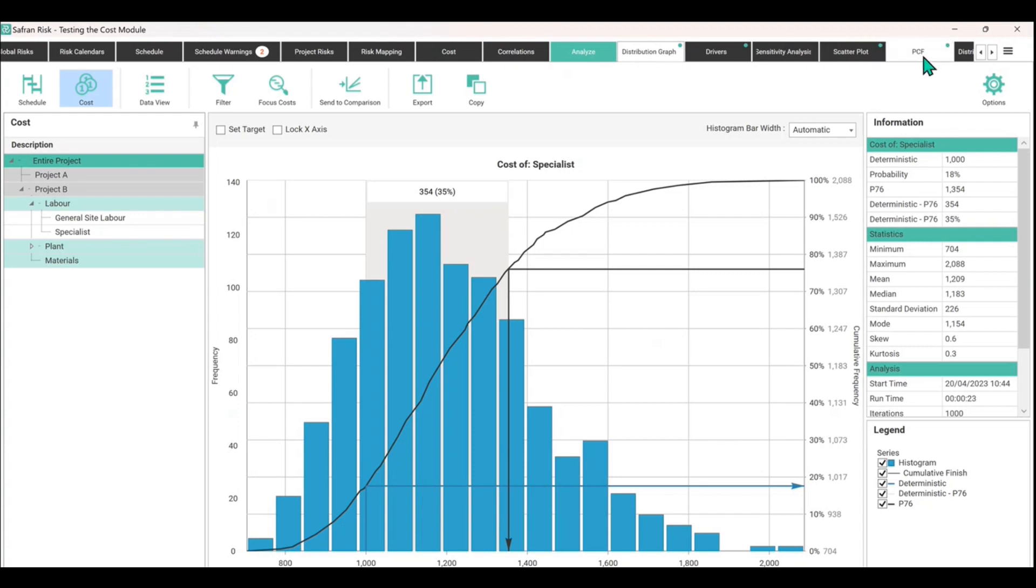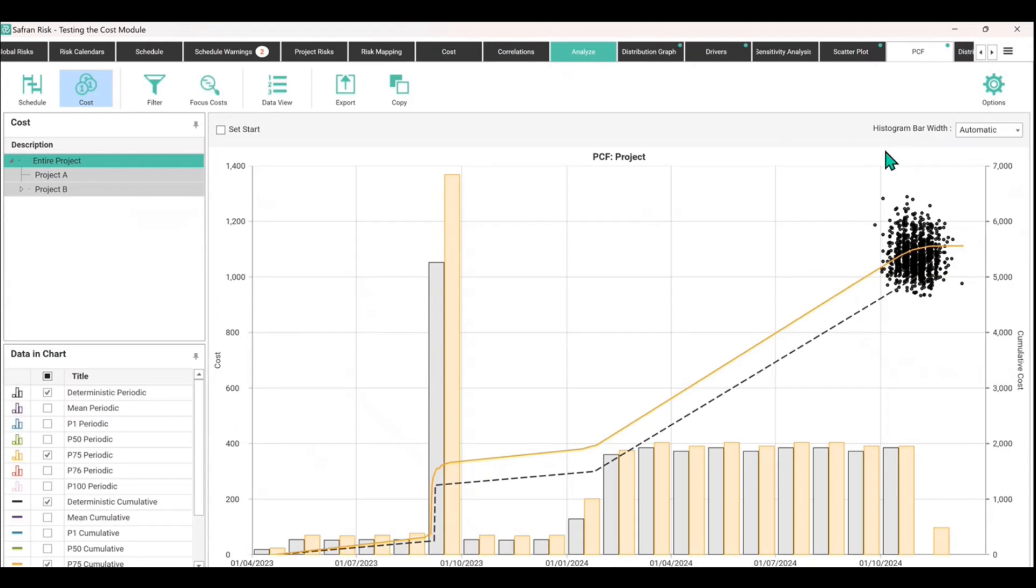You will always be brought to the distribution graph as the default after running a Monte Carlo simulation. If you come over to PCF, probabilistic cash flow, now we can see where in time we're going to spend the money.